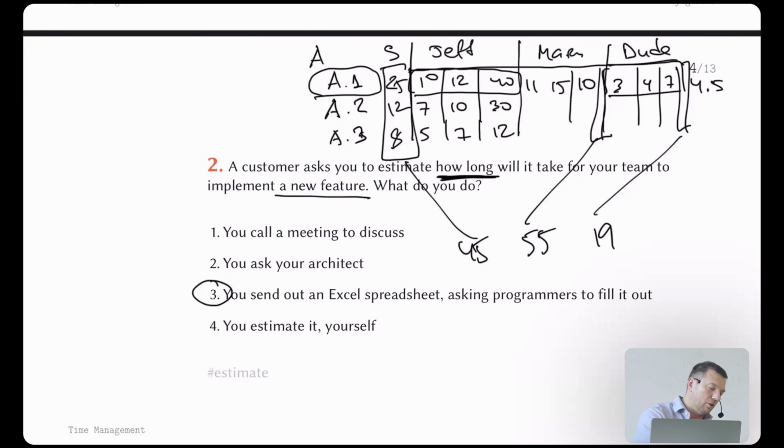They're only going to get the knowledge from the description of the feature. So all we said in the description will be visible to that estimator, and the estimator will give a best guess. And if the best guess is very wrong, then probably we misunderstand the scope. Maybe we need to sit down and think whether we properly understand the scope. So it's even going to test our scope definition. It's going to test our process in the project.